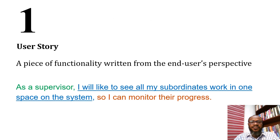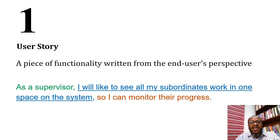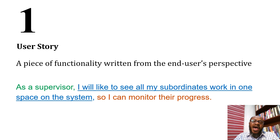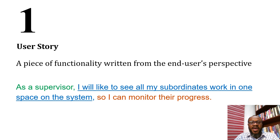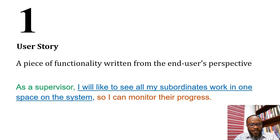We begin with user stories. In agile, features or functionalities are written as user stories. A user story is a piece of functionality written from the end user's perspective. A user story typically has three parts: the first part is the persona — the end user performing the action; the second part is the action or expected functionality; and the third part is the objective that functionality fulfills.